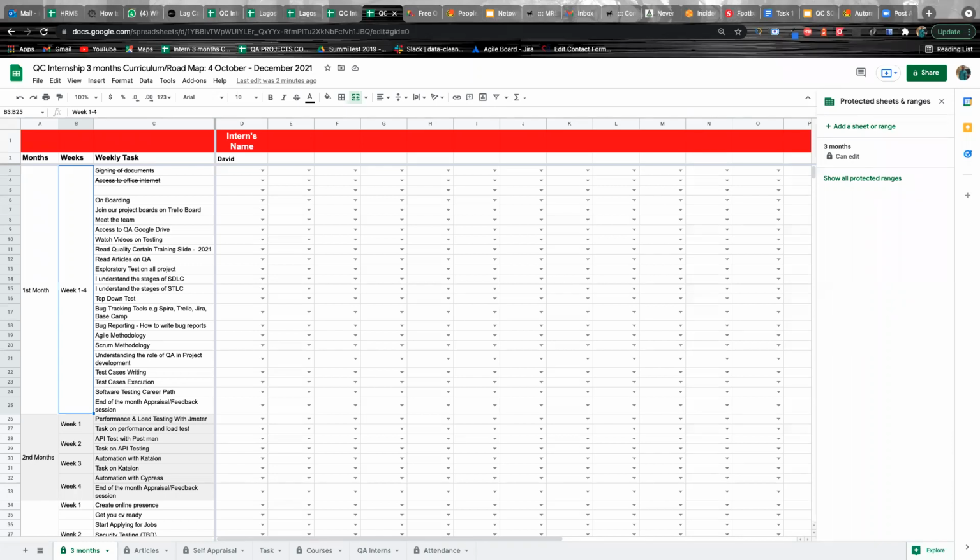Stand up is for 9 o'clock in the morning. By 9 o'clock, you're supposed to come to Basecamp, tell us what you did yesterday, what you learned yesterday, and what you'll be doing today. If you have any challenges, which is a blocker, you give an explanation of the challenge you had yesterday for not carrying out your tasks, or whatever it may be. I share that with us.